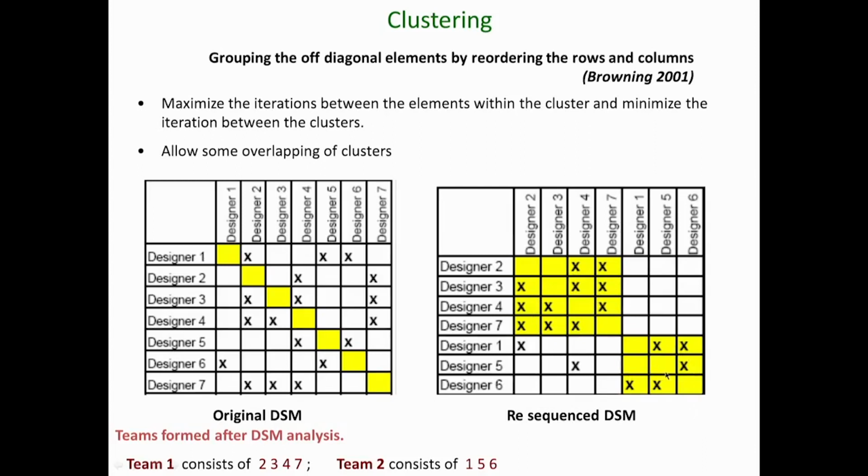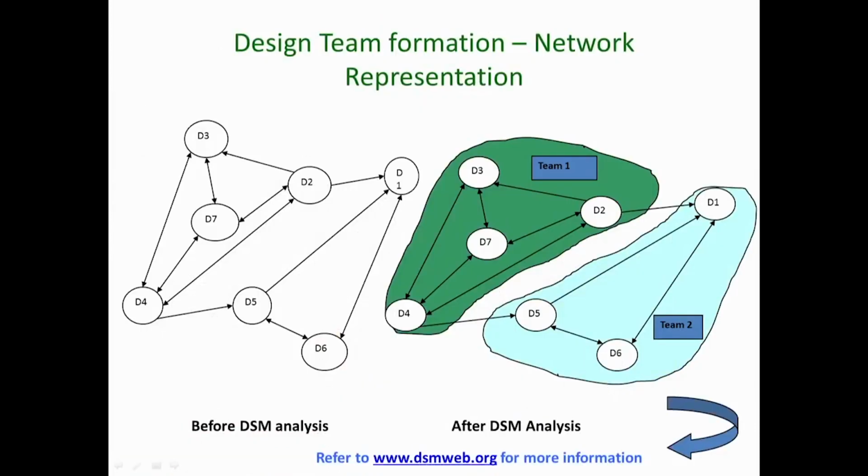Similarly within this cluster, which means I should ensure as a design manager that this group works closely together and this group also works closely together, and then they can independently give information. As you can see, this group will then give information to this. So, the design structure matrix basically results in design team formulation and coordination between design activities and design entities.